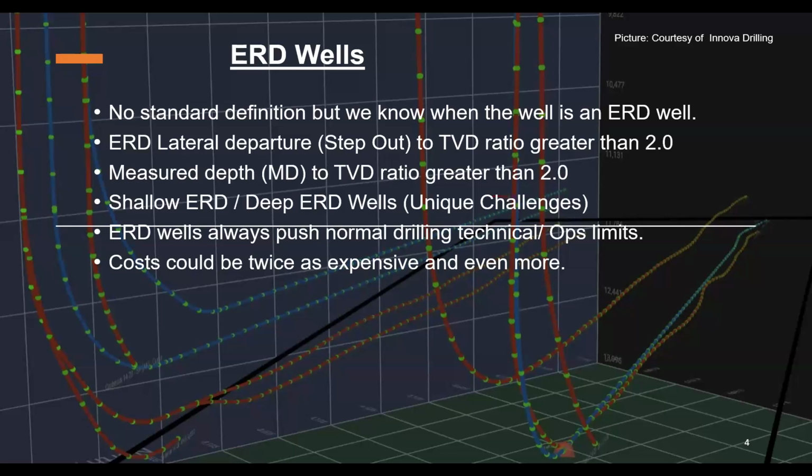So just a word about the cost. Cost of ERD could be very, very high, but they are not as high as if you run into problems. We planned for a well at $40 million once. We paid more than 80 million because we had back-to-back failures. The rig cost was $500,000 for running deep water offshore at that time, 10 years ago. $500,000 is cheap right now. It's 1 million right now, almost, after the COVID and everything.